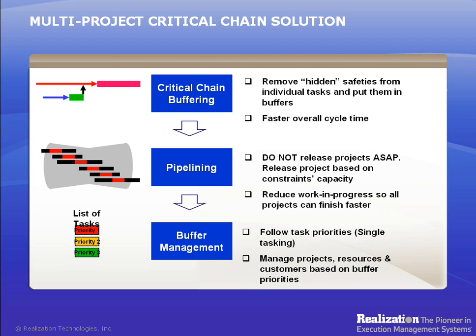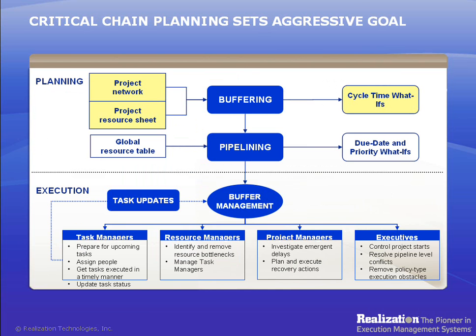This process removes local and hidden safeties from tasks across the board and puts the safety in the buffers where it belongs. Second, projects are staggered in the pipeline in order to establish release mechanisms. Having a release mechanism prevents projects from being started as soon as possible and controls the flow of work in process, or WIP, so that all projects can finish faster. Third, tasks are buffered on a daily basis. Buffer management updates the buffers and due dates based on task progress, hence the relative priorities for tasks are determined by the amount of buffer consumed. This way, a resource has a very clear priority when conflicting situations arise. In this workshop, we'll be discussing only the first part of the Critical Chain Solution: creating a Critical Chain Project Plan using the Concerto Critical Chain Client.